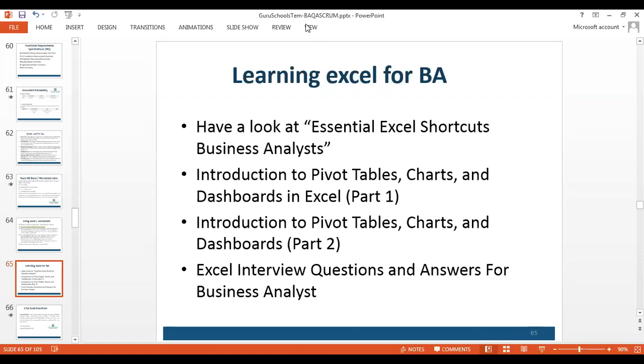So that's why whatever you take as the minutes of meeting is also important, because these minutes of meeting can be supporting or client-supplied material to your BRD. BRD is a kind of getting signed off. Whenever you are through with a meeting, you come to your office, you create this minutes of meeting, right? And you share it with whoever was there in the meeting. You share it nowadays through a portal. Normally you don't attach the document, you normally send a link, right?